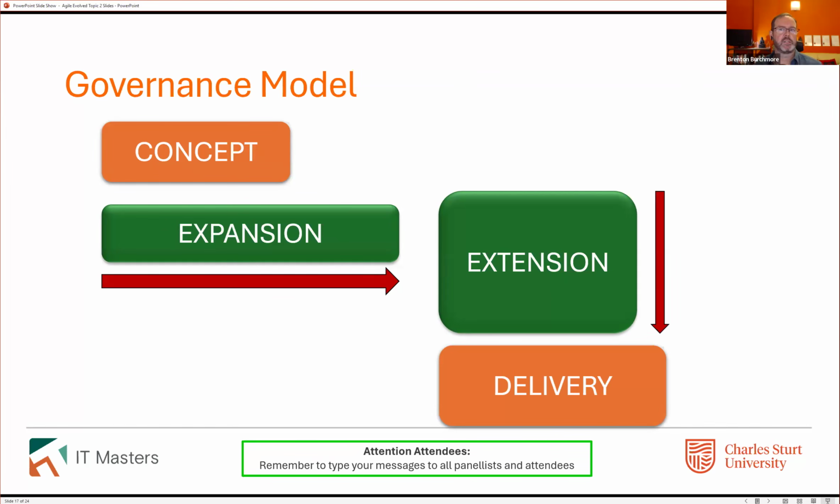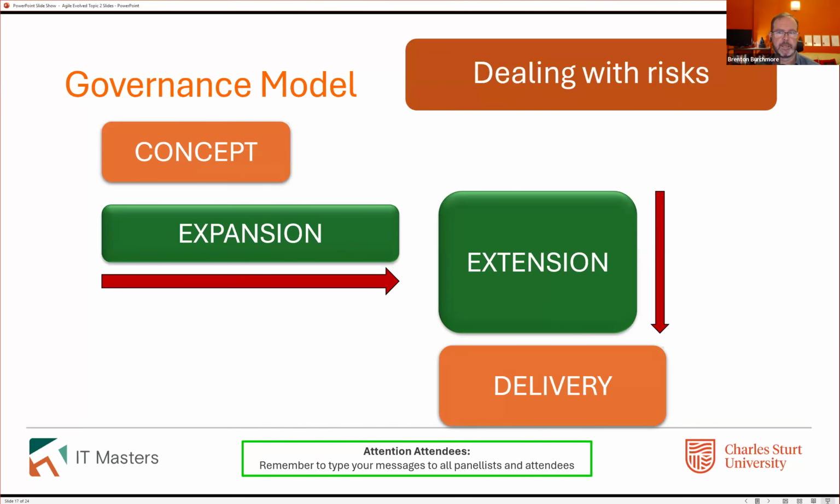And this is one of the reasons why the first few sprints often have a low velocity. There's lots of trial and error. There's what are we going to do here? What are we going to do there? How are we going to do this? We might not be doing that for another 10 sprints later, but we did have to answer a question because we had to buy something. We had to lock in some dependency. This is one of the ways in which Agile deals with risk. Because the risks of the great uncertainties, some of them need to be narrowed in the extent of risk that they bring.